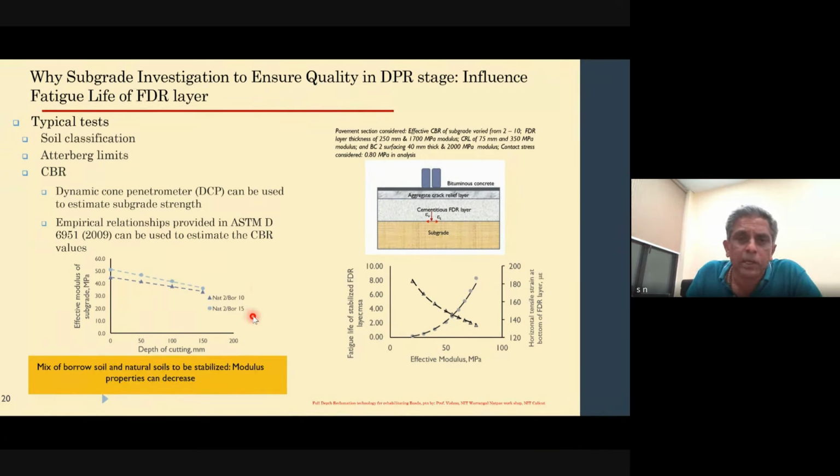Now, if you are introducing that as a liquid, the calculation gets slightly modified. The cement content, again, I'm retaining what is there, 20.1 kilograms per square meter. Additive concentration, let's say in this case, is 2% of cement content. Now, the additive that is required is 20 multiplied by 0.02, which is going to be 0.4 kilograms